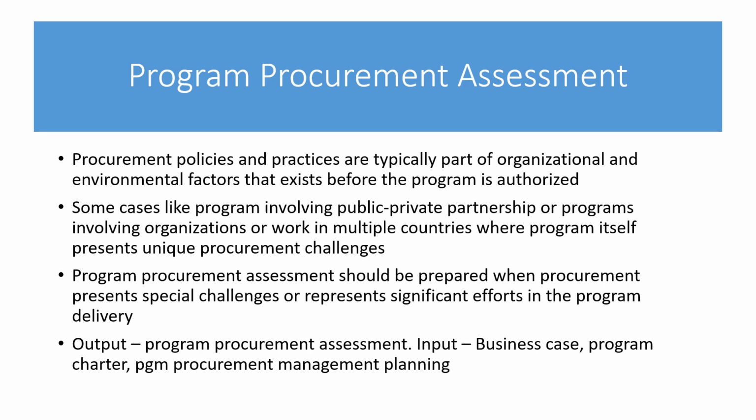So a program procurement assessment should be prepared when procurement presents special challenges or represents significant effort in the program delivery. Otherwise, you can just follow the organization norms of procurement. So based on the organization procurement policies, you can build the program procurement assessment as an output, which will be an input to the business case, program charter, as well as the program procurement management planning.